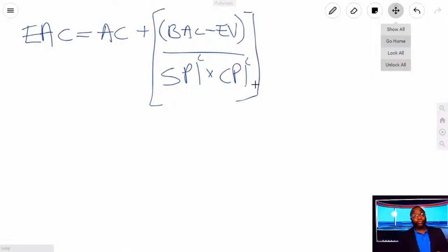So day 1, if all you've got is day 1, you just use day 1 like we did. But if at the end of day 2, you got these metrics, you have to use them. So we are using the metrics for day 1 and day 2 cumulative. If you use just day 2 on its own, you're going to get the answer wrong. You got to combine them, folks. And that is the big thing about the EACs. It is cumulative. Okay? It's cumulative.